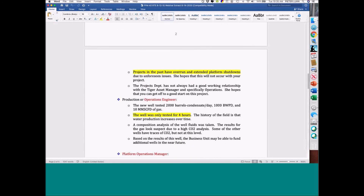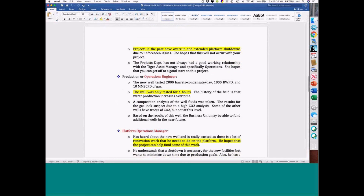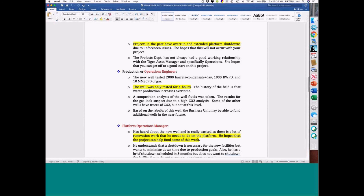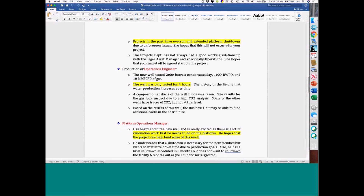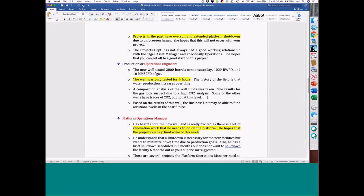Then you go to the operations engineer. The ops engineer — you see the well test and all that. They only tested the well for four hours. For those of you with an upstream background, that's a red flag — obviously a huge red flag. Plus, they're not sure about the composition of the well.